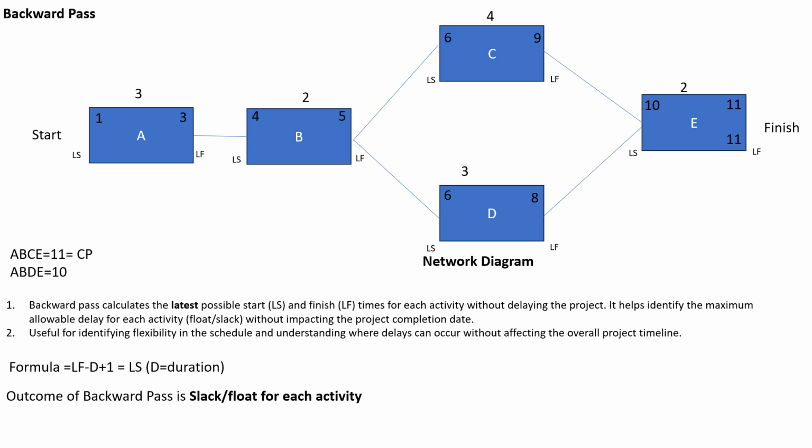And because the duration of this activity is 2 days, if you go this way, you finish this activity on day 11, which is one entire day, and day 10, because we are going backward, is used to start this activity, and this is counted as one day.